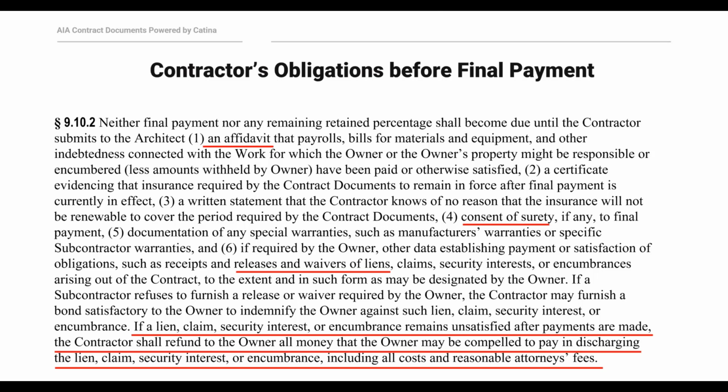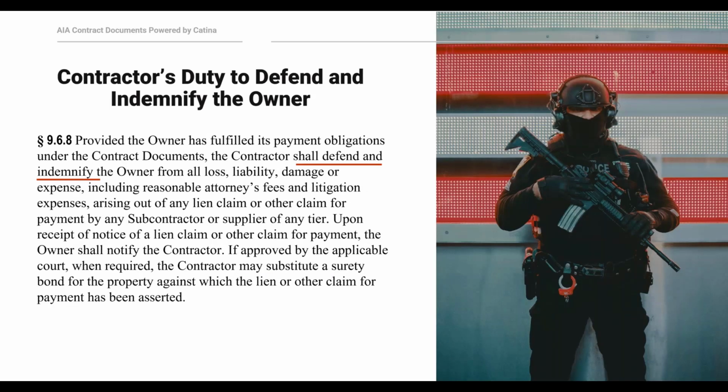Another point about that slide, you're talking about the protections of the owner for it, but I'd also like to chime in about how this is also a benefit for contractors as well, because under our A201 and our A401 subcontract, this obligation is properly flowed down to subcontractors. So this is another provision that contractors can look at and look at their sub saying, you have an obligation to indemnify me.